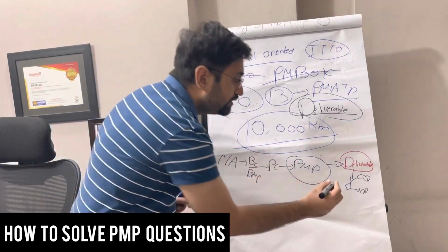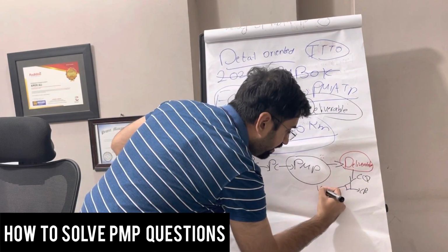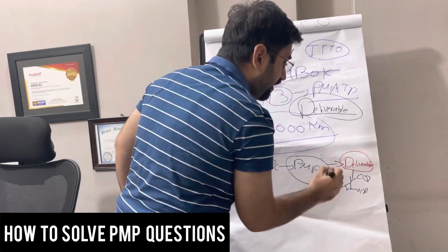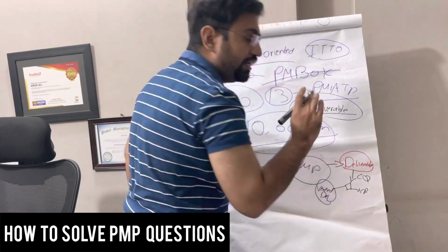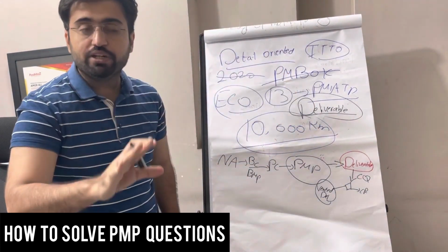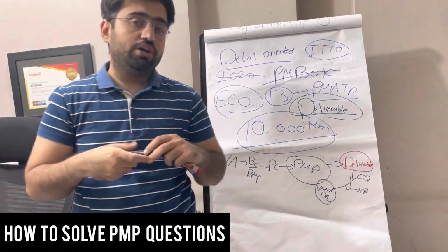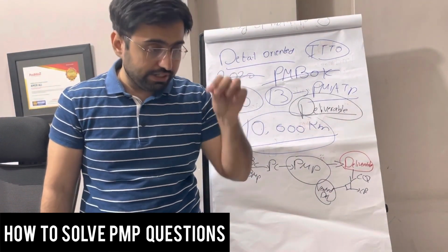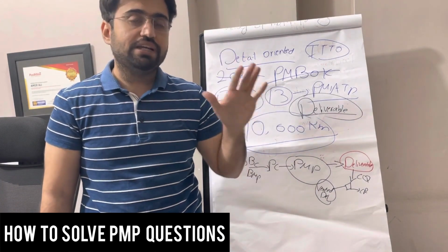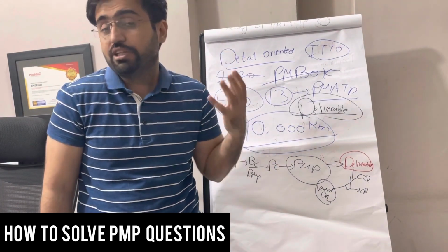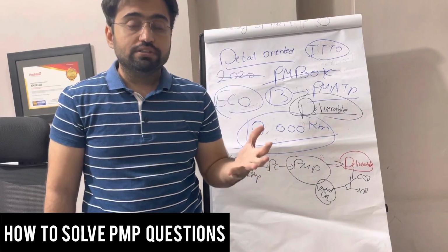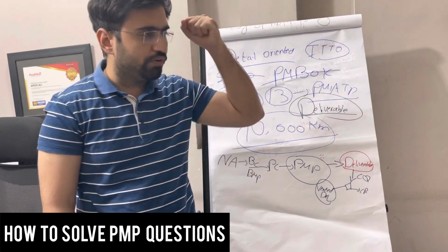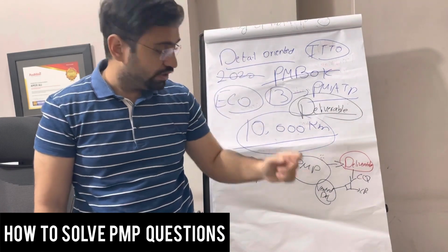They become either a preventive action, corrective action, or defect repair. If they are approved, they become verified deliverables. That means quality has verified that these deliverables meet quality standards. Very important to understand: the client has not agreed to this deliverable. Internally the quality team has checked that these deliverables are good to go, and the quality team accepted. If you go to the market and you see a stamp of quality checked, quality control, this is the way.